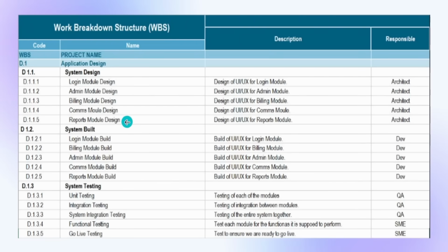So, one thing about these tasks is that you don't want to get too extremely granular, because what will happen is you'll spend so much time on the work breakdown structure. And this is especially true if you're working on an iterative or agile project. You want to have the higher level milestones, not too high, but kind of like what's listed here, where you have the various designs listed out. And you can have milestones here for that completion. And then here, especially for software development, you have builds of various components of the system.